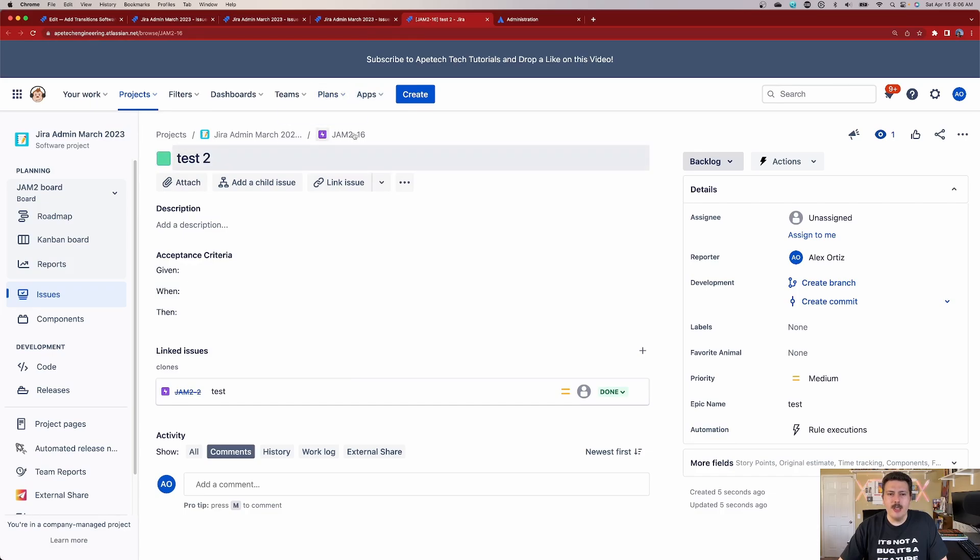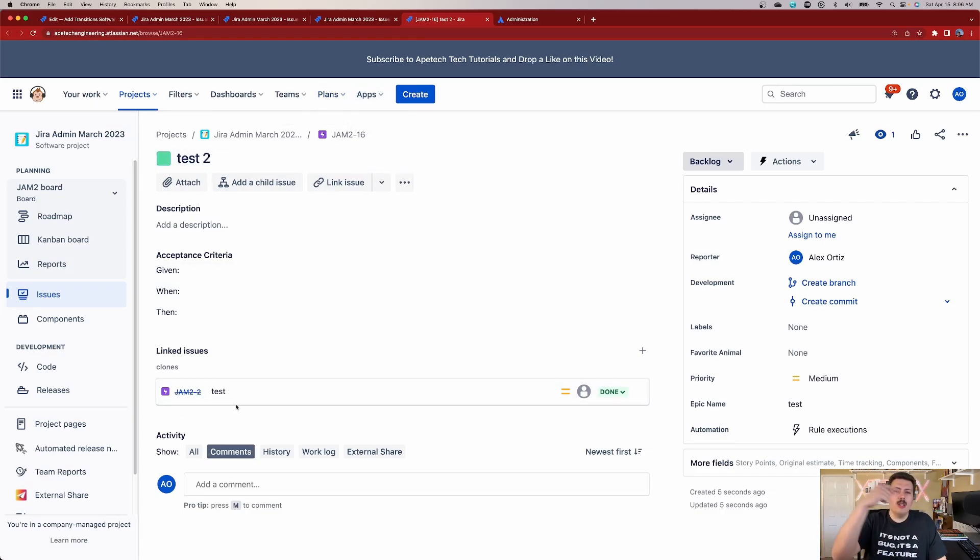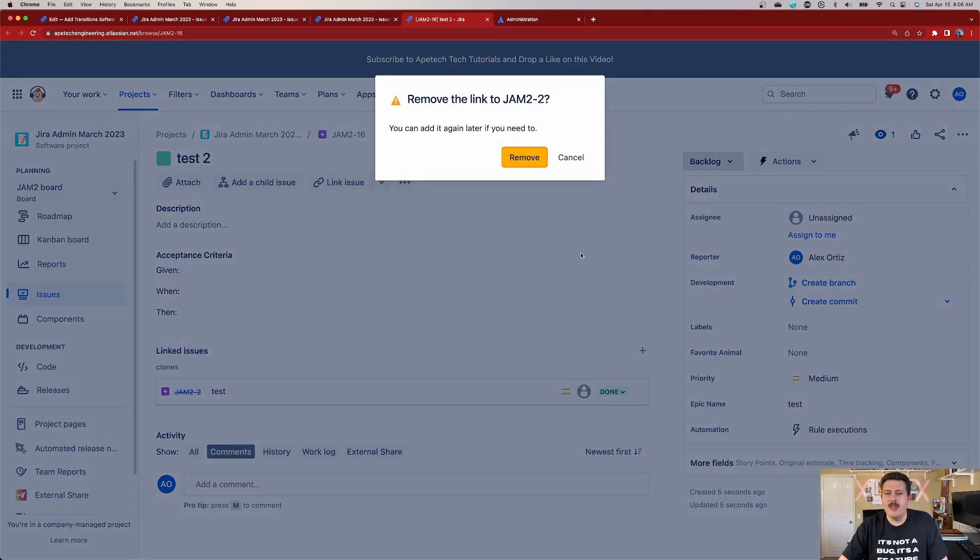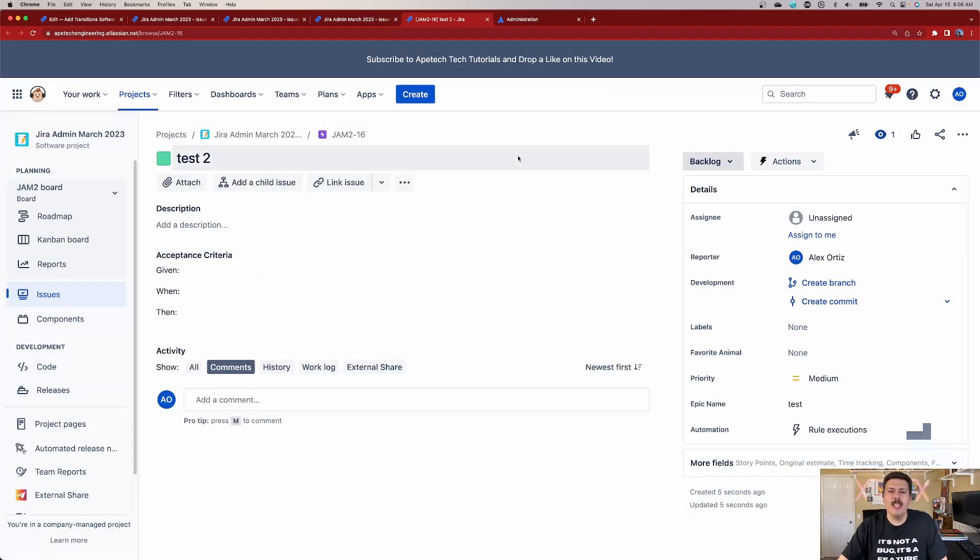When you hit clone, it's going to go and do it. Now you can click on this open clone issue and you're going to see that you have your clone here. This is my test too. It's still an epic and it linked it to the original, to the source. If you don't want that, you can just click the little X, remove the linking and that's it. You've cloned an epic, but the stories didn't get cloned, which is really the bad part. This cloning functionality, while cool and useful, could be a lot better, but rest assured there's plugins that are going to help us out with that.